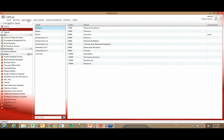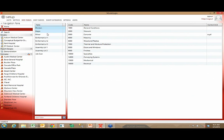The work breakdown structures available to you for modeling — whether CSI division, Uniformat code, or a systems view — are all user-defined. However you break your costs down within your projects at your organization is what's available to you to model from. You'll see how this comes into play shortly.